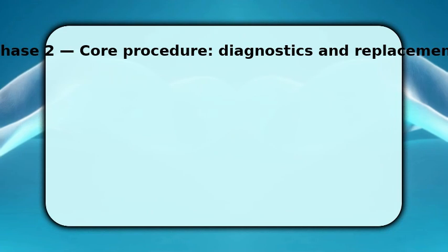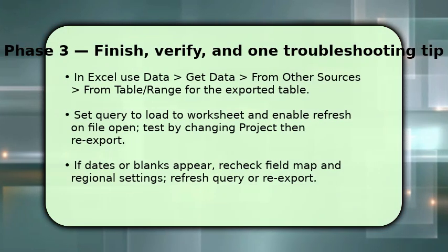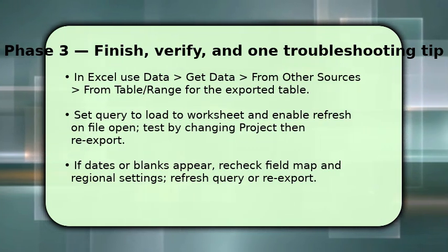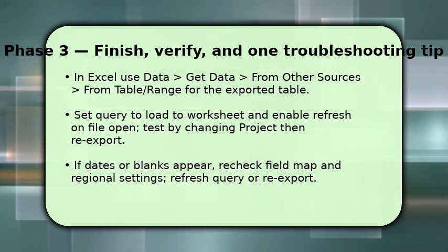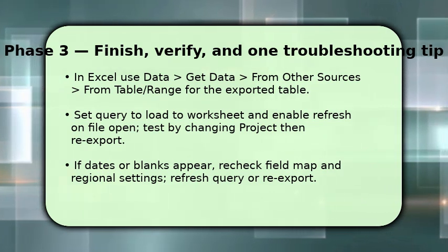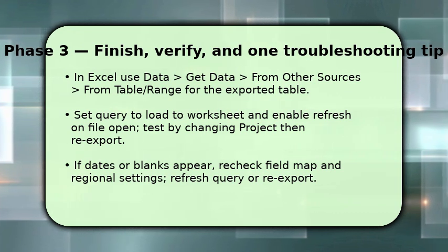Finally, in Excel, turn the exported table into a query. Select it, then Get Data from Table/Range. Load the query to the sheet and enable Refresh on File Open. To update, re-export from Project using the same map, then refresh the Excel query. You'll see changes flow in.